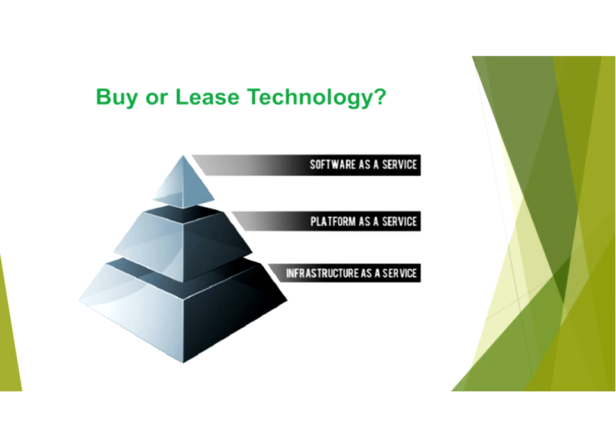Should you buy or lease technology? You've heard terms such as software as a service, platform as a service, or infrastructure as a service. RFPs often use these to buy functionality using software as a service, and perhaps the hardware as well, where the capabilities are bought through a subscription. The vendor is responsible for installing, maintaining, and updating the software and hardware and training the users. Software as a service can also include training the user to update and replace software and hardware as a cost reduction measure.